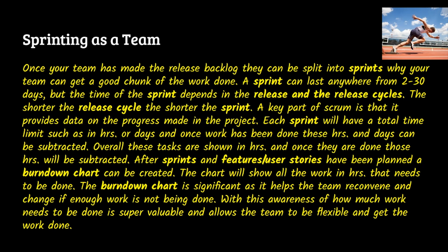So the burn down chart, as I said before, shows the progress that's being made through these hours. Basically, at the beginning, you have the total number of hours from all the tasks that need to be done. Once you've had this, you can start doing the work, and slowly those hours will decrease, and it shows that progress is being done. If you want to meet a certain hour limit by day 30 or day 20,